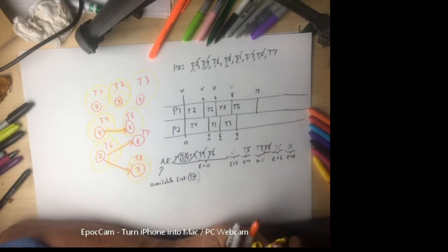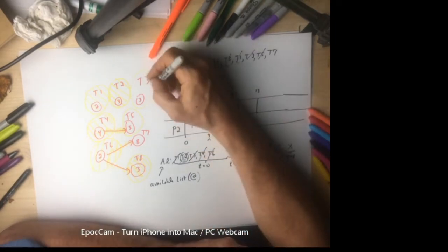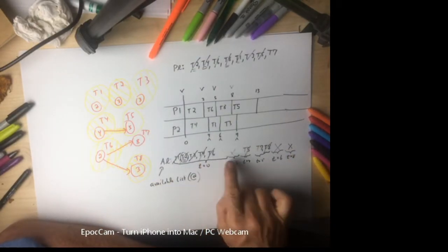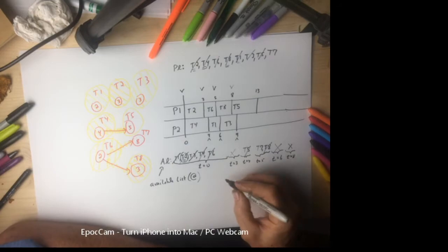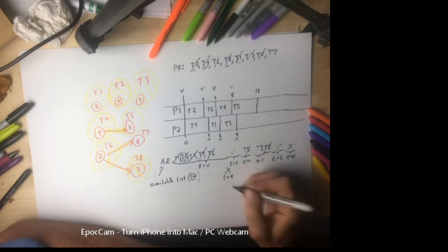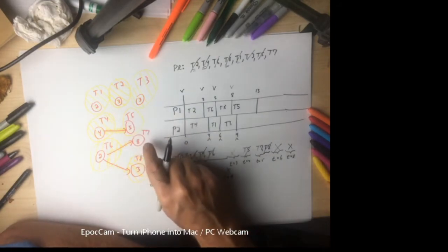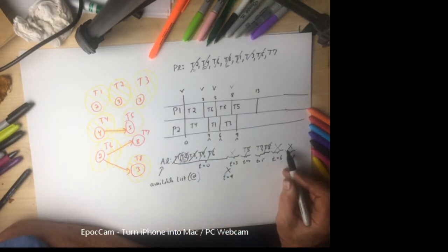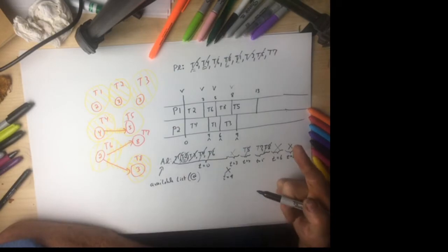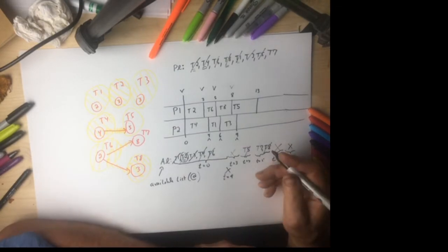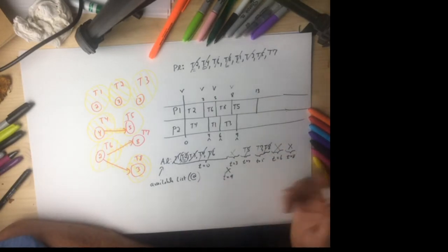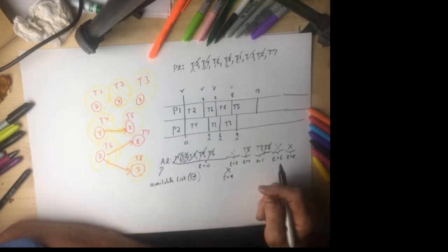Person 2 goes, "Boss, I finished T3." He goes, "Great." Looks at the schedule, says, "Oh, nothing new available at time equals 9, but I've got job T7." Well, there are no other jobs. It's just T7. He doesn't have to look at the priority list. When he has no choice, he just assigns one job, one available person. One available job, one person, plug it. If there have been 2 available jobs and 2 people, plug them in.